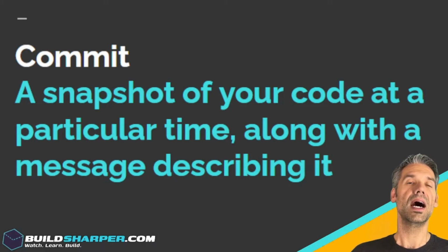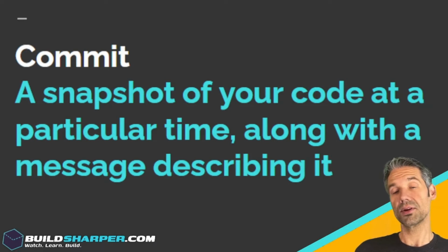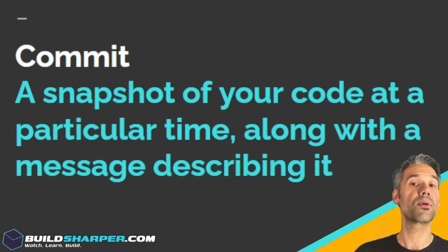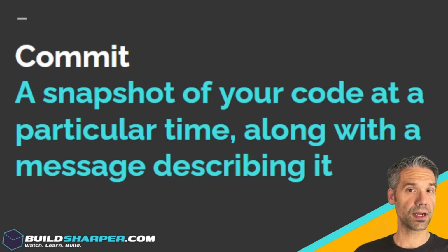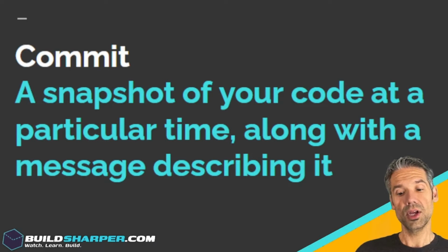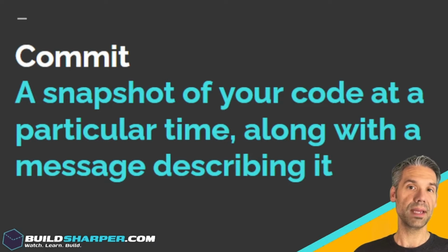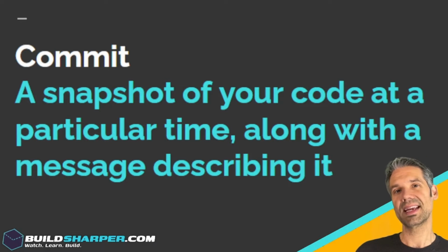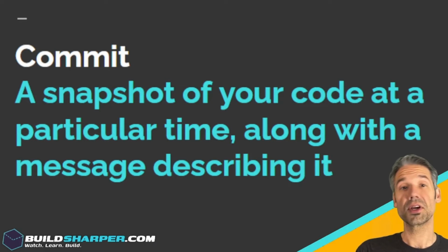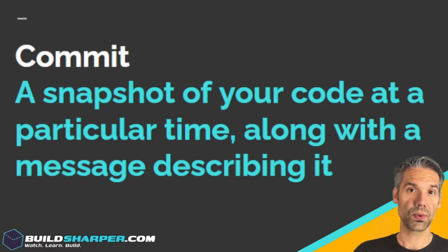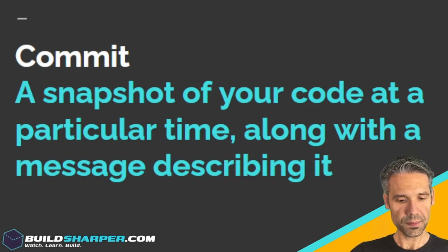In general, if you're coupling your development with Git and Jira, Jira is an agile development system used for project management. So if you have maybe a story in Jira that you're working on, you can label your commit with that story so that it ties together: here's the ask in Jira, and here's the code that corresponds with that story, okay?